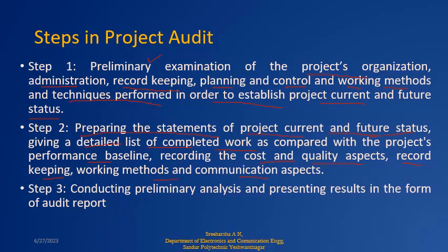Then conducting preliminary analysis and presenting the results in the form of an audit report. What they have identified through this audit, what are the suggestions that are being made, all that is done and they are presenting it as an audit report. So these are the three steps: first, preliminary examination, then preparation of statements, and presenting the audit report.